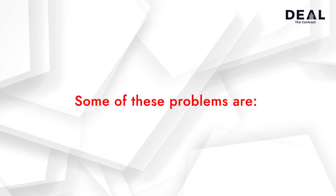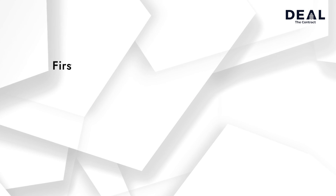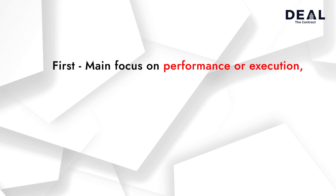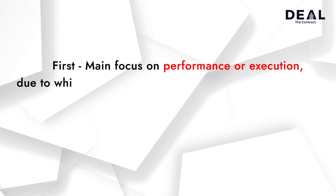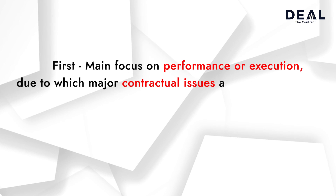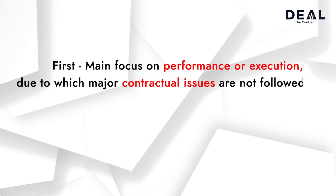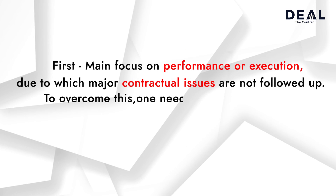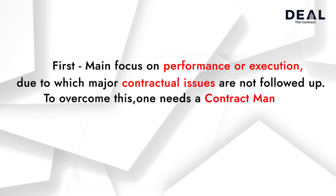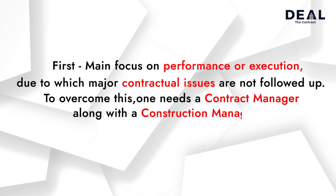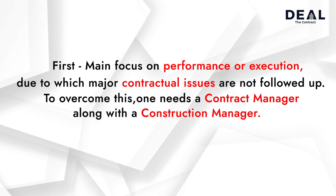Some of these problems are: first, the main focus on performance or execution, due to which major contractual issues are not followed up. To overcome this, one needs a contracts manager along with a construction manager.